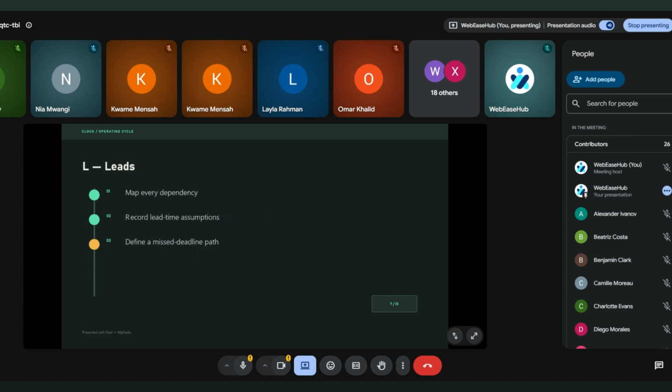Once the cutoff is clear, we work backward. The mistake I see most often is planning from the visible event forward. A team begins with payday, payroll submission, or the date a report is due. Then it adds tasks backward until the calendar looks full. A better approach is to identify the earliest dependency that could block the outcome and plan from there.